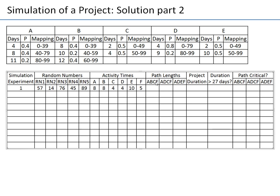Now computing path lengths: A→B→C→F = 8+8+4+5 = 25 days. A→D→C→F = 8+4+4+5 = 21 days. A→D→E→F = 8+4+10+5 = 27 days. So A→D→E→F is critical with project duration of 27 days. We did not exceed 27 days, so we record zero for the exceedance indicator.